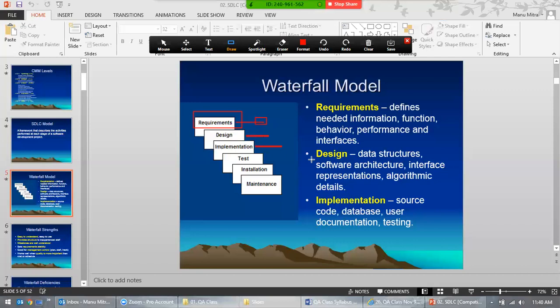Now, let's say you finish these three documents: the test plan and the test strategy document. Here, you want to work on your test cases. You have to write your test cases, right? This is the time you have to write them. You cannot write them during testing; there's no time for that, because the testing phase will be really short, maybe one week. So you want to start writing in the implementation phase.